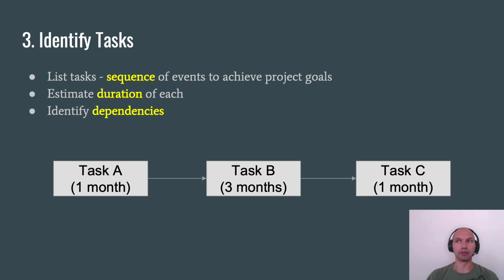Kind of like when building a house, you cannot really erect the walls and install the roof until after you poured your foundation and it had dried up. You cannot really start writing a song until everyone agreed that this is the style of music that we're going to use for this particular effort. That's why identifying dependencies is so crucial.